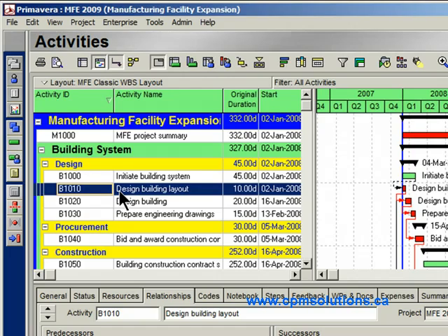Well, if I wanted that activity to span the entire duration of the project, or a particular phase, maybe the construction phase of the project, what is the duration of that phase or of the entire project? Now, I might know if I have the entire project built or the entire phase is built, but that may also change. So it's unreliable for me to actually hard code a number in there.